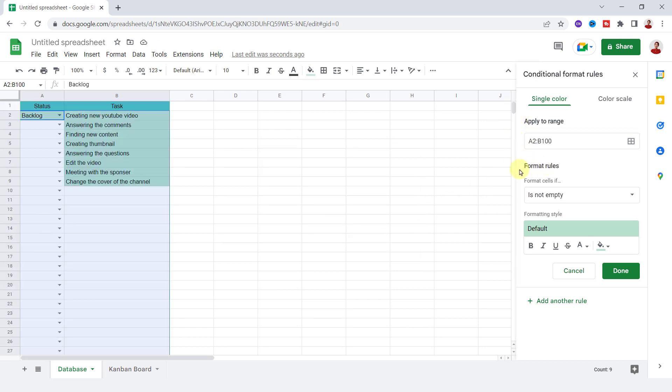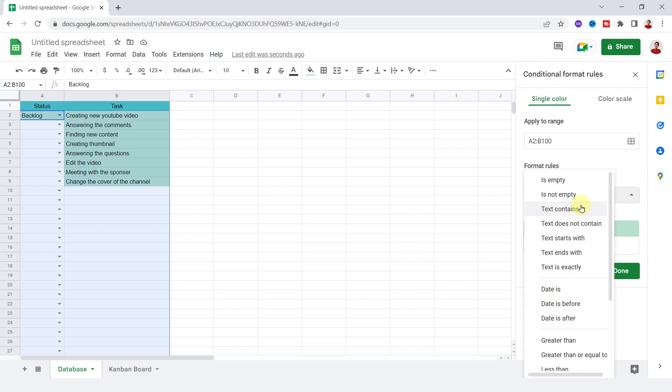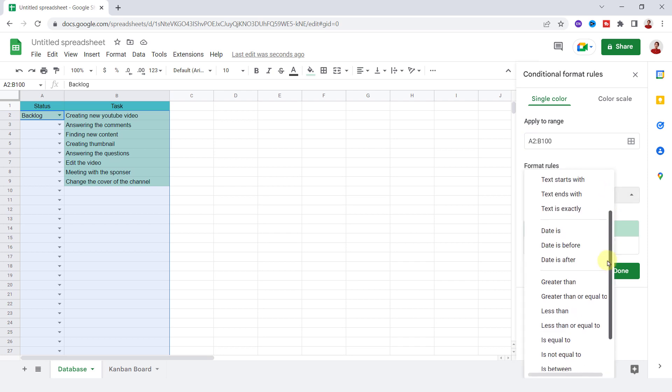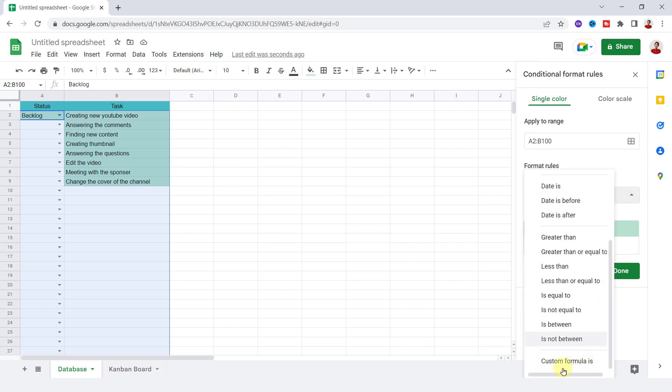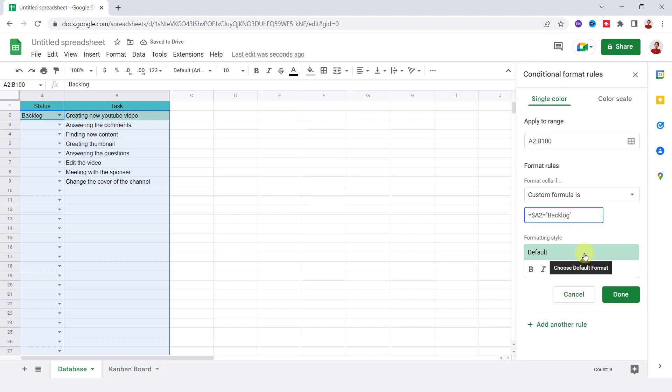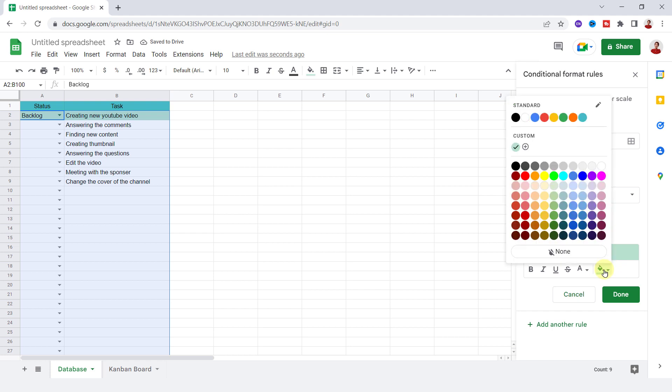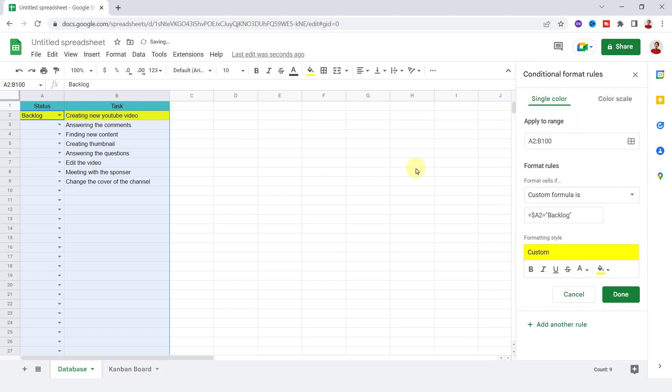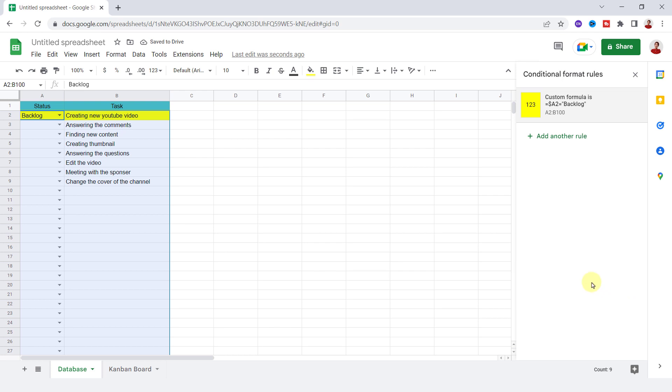Now for format rules, I open the dropdown list and choose custom formula is. Okay, on the value or formula box, I enter the formula. So when the A2 cell, which I fixed with a dollar sign, is equal to backlog in quotations, make the entire row yellow. And done. Now I do the same for other statuses and give them specific colors.